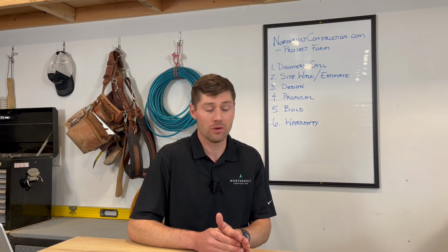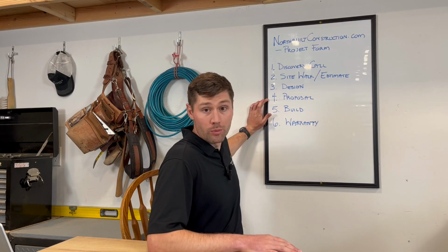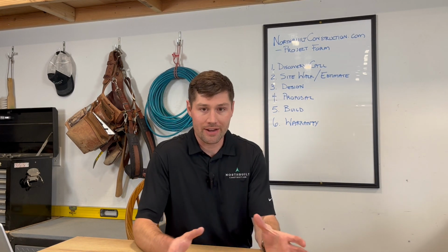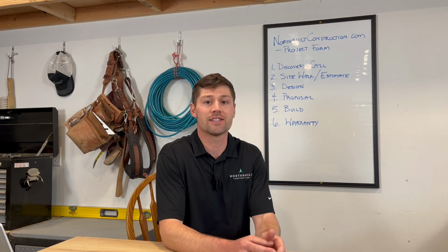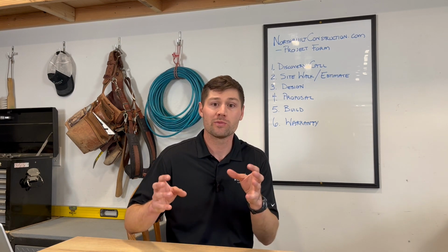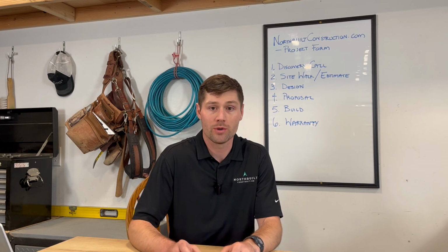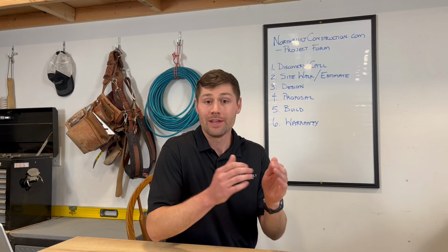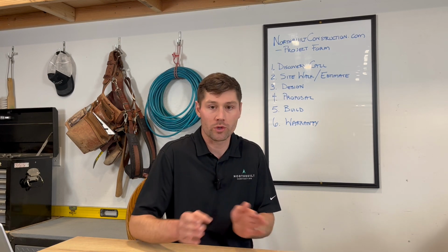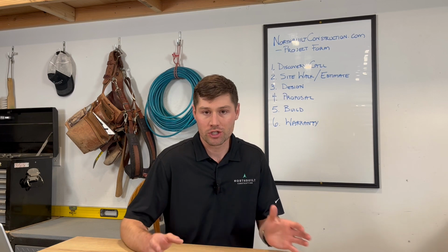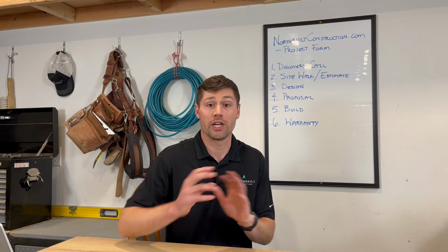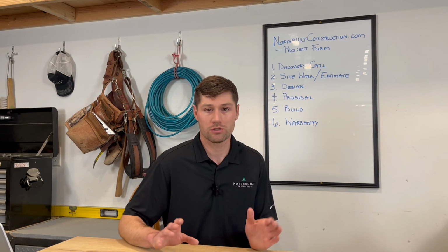That gets us to number 4, proposal. Proposal is taking everything that we've compiled in the design phase and saying, hey, all of those parts and pieces, everything you want, this is what it's going to cost. We conduct hard bid proposals, which means this is the price for this scope of work. Now, if that scope of work changes a little bit, we might have to adjust that proposal with a change order after the fact, which is totally fine.